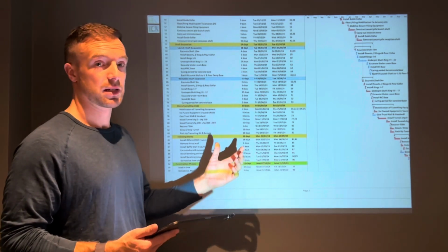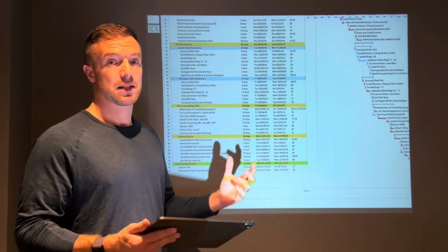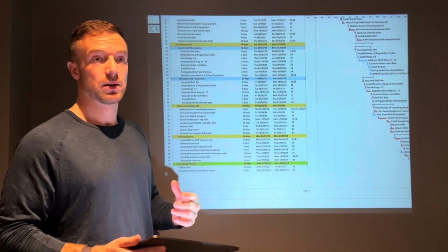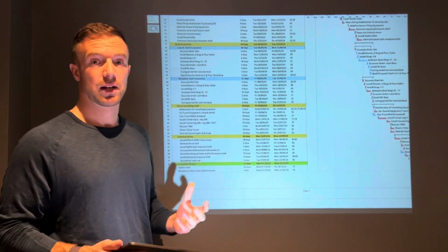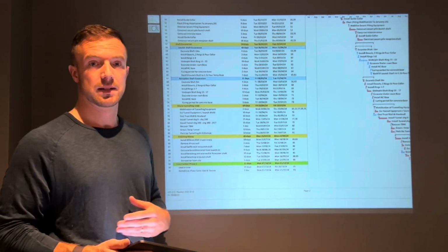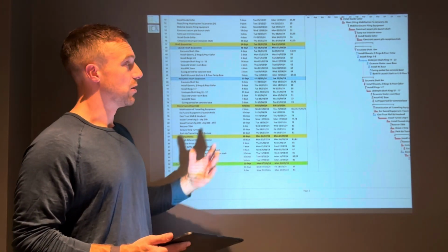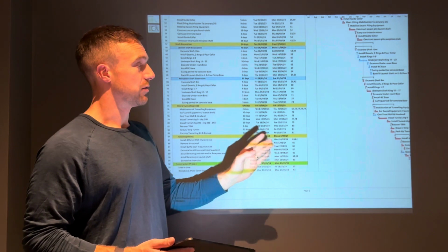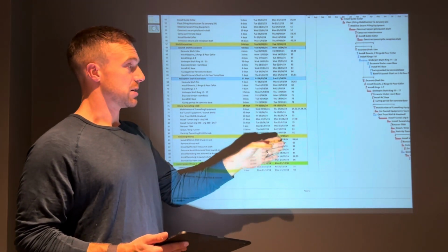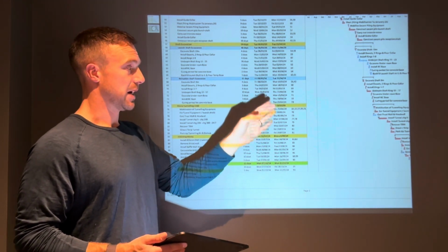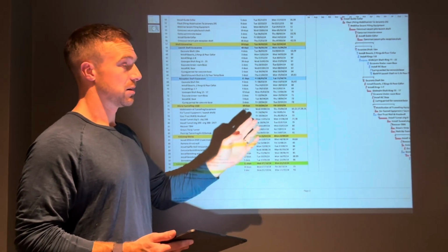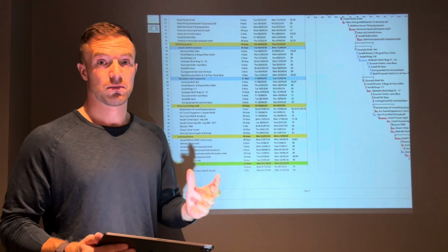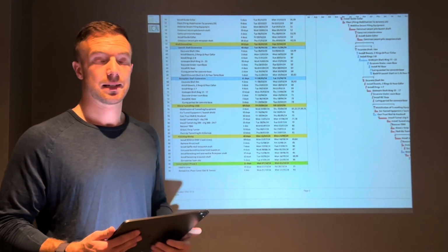So say you estimate the work to be 83% complete, but you've only got 2 days to do it. Is that going to be enough to achieve that completion date or not? It starts to flag these things up. Another thing you can do is baseline it. From your first program, you can set a baseline, and then after that, with each amendment that you make, you can see how your program changes, which is another good way to manage progress and plan ahead.